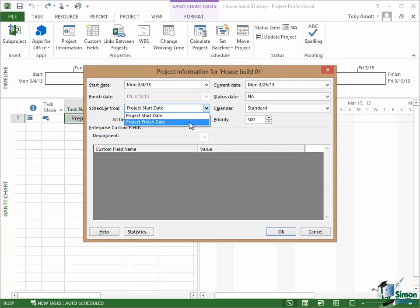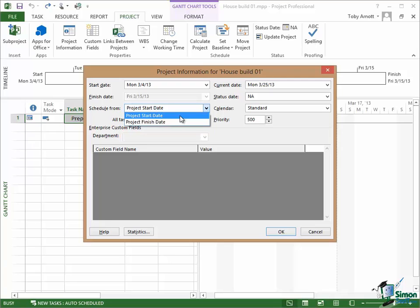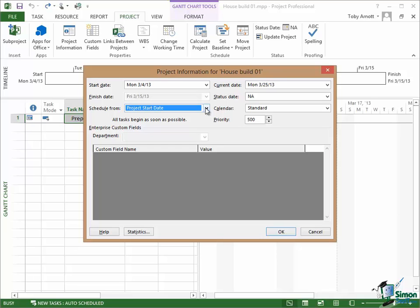And that is you'd have a finish date and you'd know I must be finished by that date and rather than saying as with the start date scheduling that I want to finish as soon as possible, you may say, here's my end date but I want to start as late as possible. So I don't want to start getting ready for this event now if I don't need to. Tell me how late I can leave my preparations. Now they're the two fundamental ways of working with Microsoft Project. Most of the time on this course we're going to be using scheduling from the project start date but note that scheduling to a project end date is equally valid.